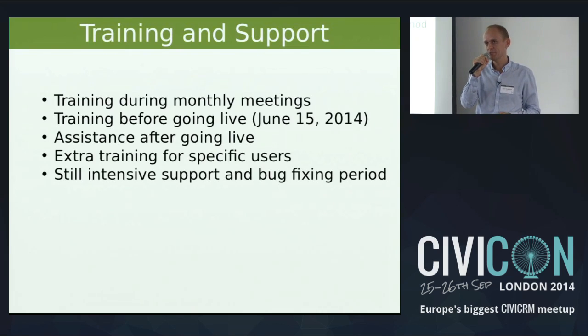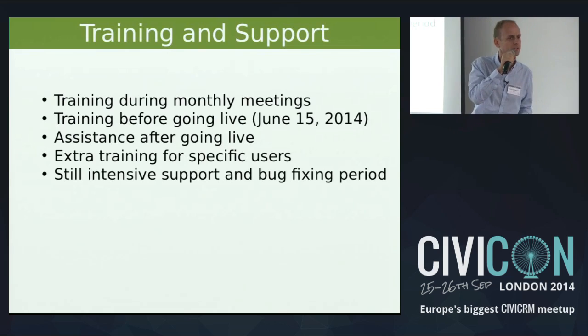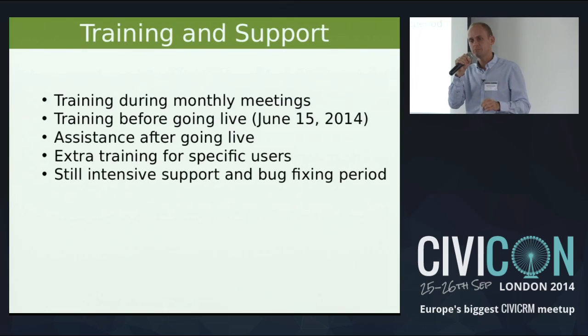And we asked the people, I think it was around October or November of last year. We said to them, OK, our meeting is from 11 till 1 o'clock. But come earlier. You can come at 9 o'clock or at 10 o'clock, it doesn't matter, depending on the traffic. Just bring your laptop. You can sit in the conference room, and in the meantime, you can test the system. And so then they really started to test our code.